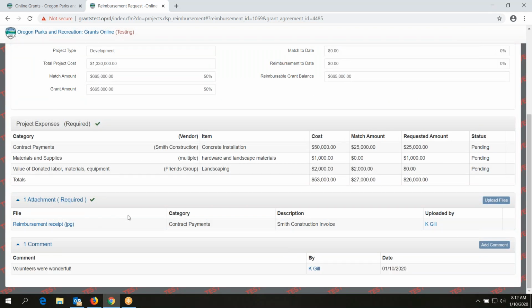Save. So then you have this. We need at least one attachment before you can submit, but you need to submit invoices, tracking, if there are contracts that they're following. What we need to see is proof of the cost, so we need evidence of what they did. So if you get something from a contractor that says February costs or February work in an amount, you should have them spell out on that invoice what part of the work was completed. We'll want to see that because this is documentation that they did the work and at what rate.